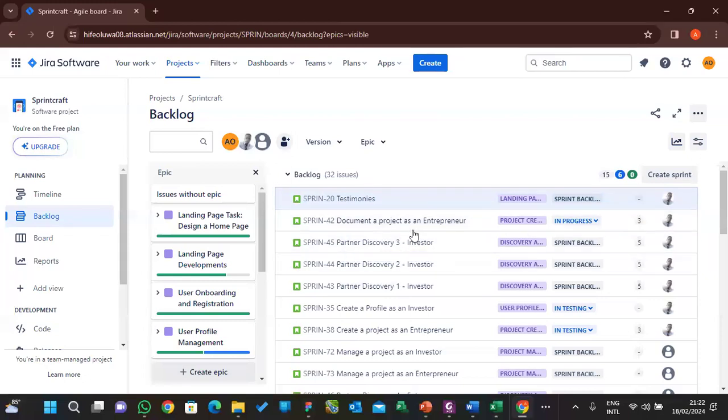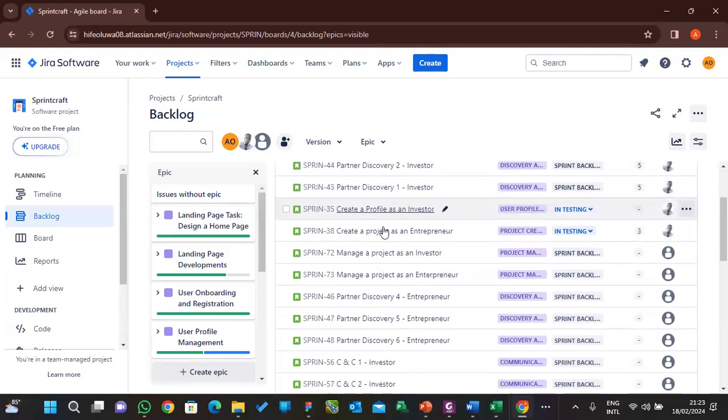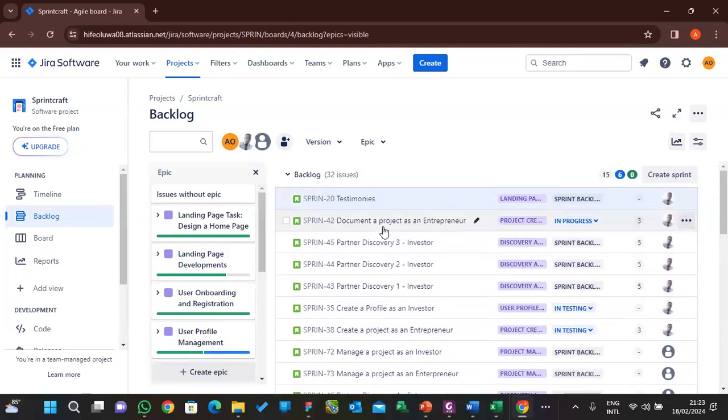Then the second part of that meeting is that the development team will develop the plan they're going to use to deliver the selected product backlog items that the product owner wants them to deliver. Also in that sprint planning, the product owner will propose the sprint goal, an idea of what he wants them to deliver for that particular sprint. So you propose a sprint goal. That's how that works.